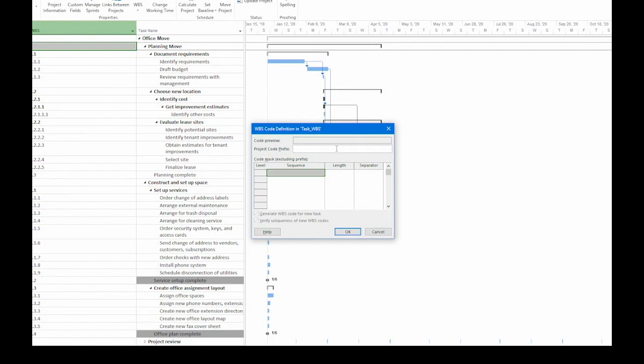We're going to start with the project code prefix. Now, this is optional, but if you have multiple projects and you want to have a prefix to uniquely identify each project, fill this in. For the office move, let's say I type in OFC and then a hyphen. Notice the code preview is going to show me what a sample WBS code looks like.